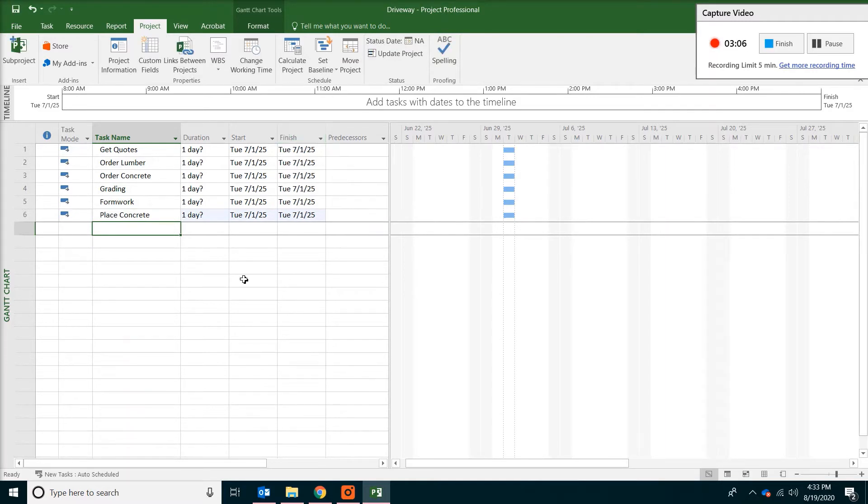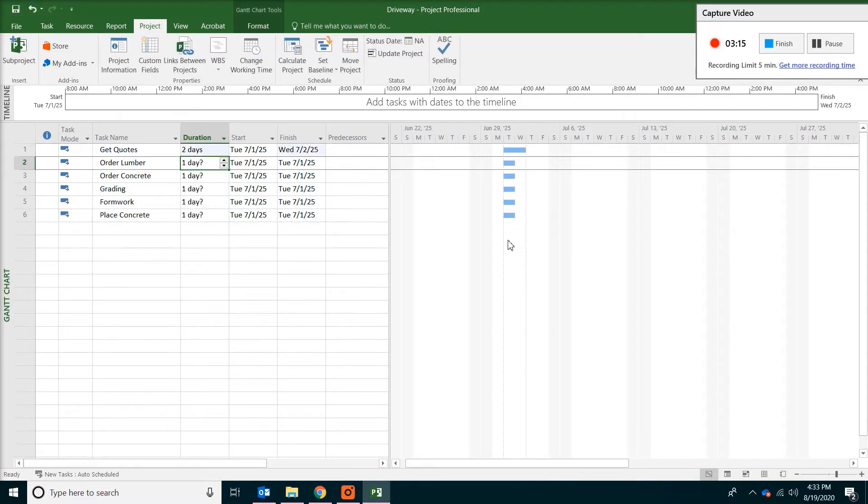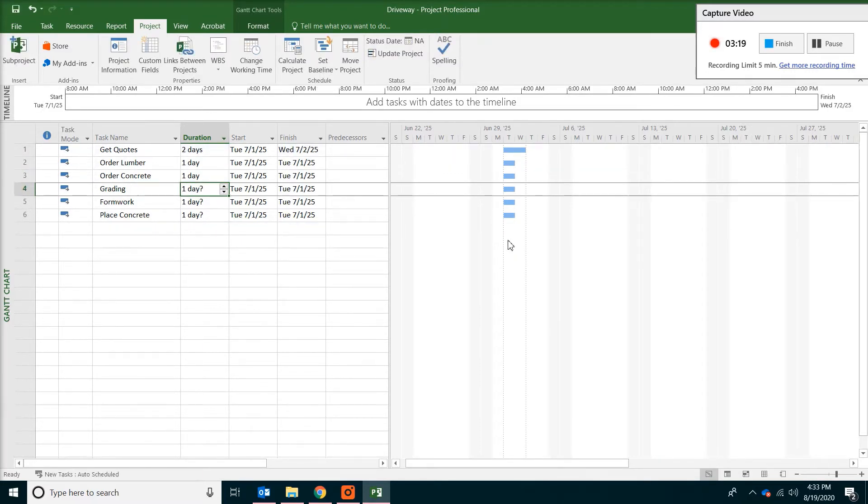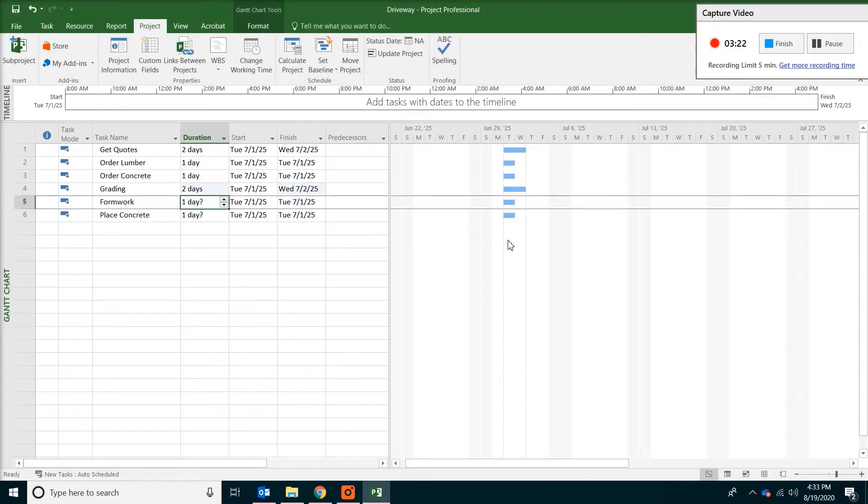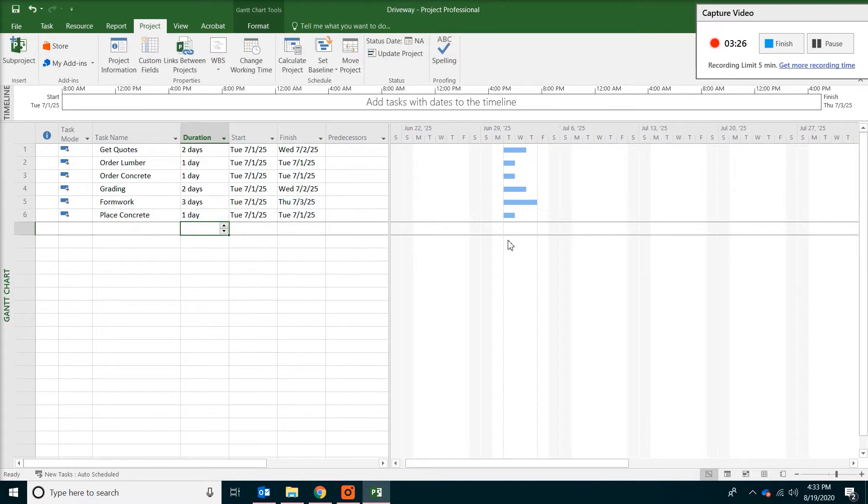So this is the task entry. Really simple. And the duration we are going to do is usually by days. So we are going to say two days to get the quote. One day each to get all the material. And the grading will be two days. And the formwork is three days. And the concrete placement will be another day. So that's duration entry.